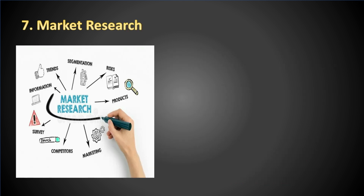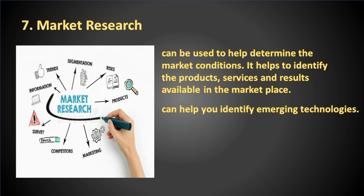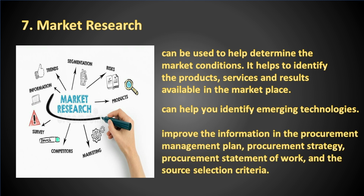Market research is a technique employed in the plan procurement management process. It can be used to help determine market conditions and identify the products, services, and results available in the marketplace. It includes examination of industry and specific seller capabilities. Information can be gathered through conferences, online reviews, etc. Market research can help identify emerging technologies and improve the procurement management plan, procurement strategy, procurement statement of work, and the source selection criteria.